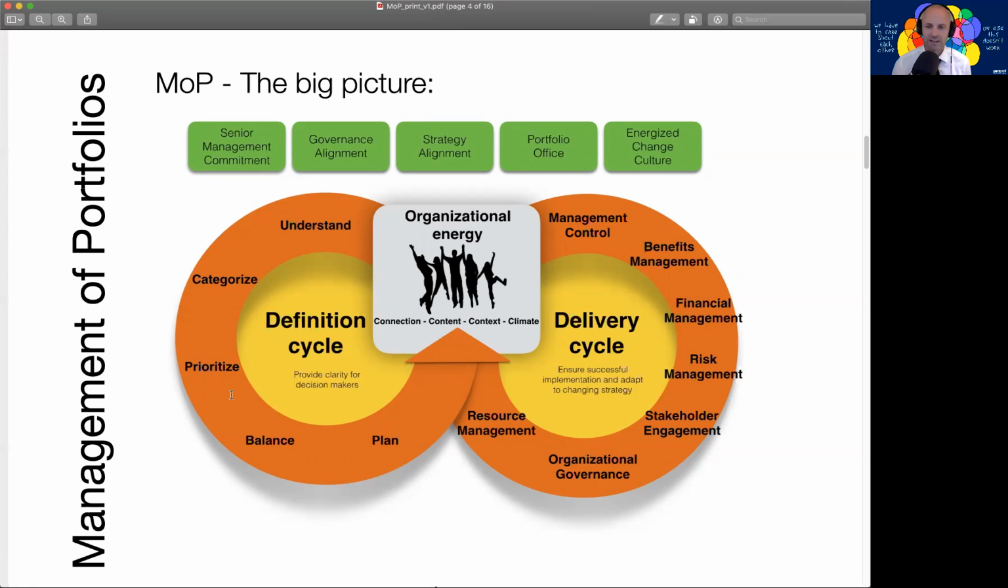Risk management, again, exactly the same. There are all of these different projects. Let's say we have 40 projects, and in each project, everybody says that they have control over risk, but portfolio collectively, do we have collective control of risk? For example, this aggregated risk or over reliance on a single supplier across projects, where we see if something happens to one of our suppliers, the domino effect that can have across our projects.